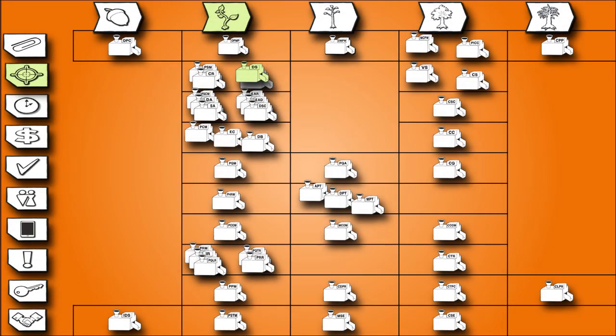When people think about scope, they usually think about time and cost. Time and cost are the outputs of scope. They're figured out after the scope is defined. After all, you don't want to estimate how long it will take and how much it will cost to build a bridge before you know how big that bridge needs to be.